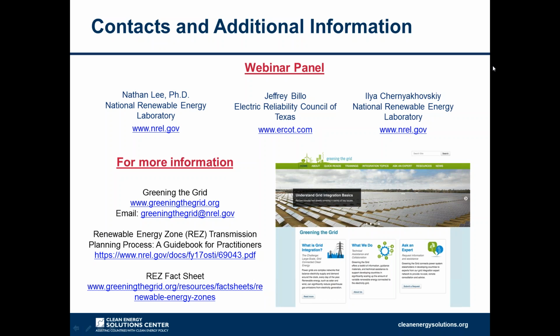At that stage, we do not take into consideration the cost of extending transmission to those zones, to rank zones, or any of those kind of actions. I think the transmission system costs are considered at a later stage, where we're looking at transmission system options to connect those zones, because we really want to make sure that we don't limit ourselves to resources that are only close to load, only in specific regions. We really want to identify and harness those best resources wherever they be, and then identify how we can connect those best to the load.